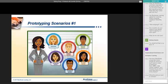We're going to read through your documentation. We're going to get together with your SME. We're going to have questions for your SME. We're going to need an hour for each one of the modules to be able to get all of our questions answered.